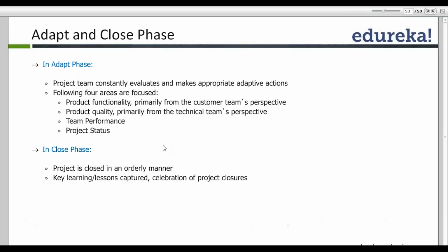Within that timeline, whatever you can do best is what you should be going for. You tell the customer that, okay, we'll work for 1 year. Within 1 year, whatever you can add or subtract from the scope is what works best from the agile team's perspective. Fixed time, basically. A fixed duration model.